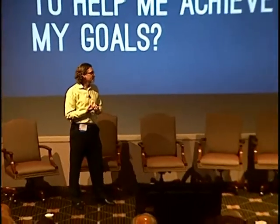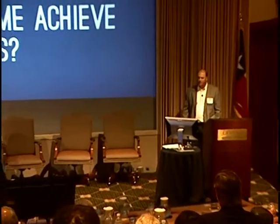And then the other big thing is this idea of early procurement and can you finalize design? Can you get that early procurement piece done and make those commitments well ahead of your build program? I think that's where ultimately you'll get that schedule success. That's definitely the big dollar issue there, making that commitment, and you can really save a lot if you do that.